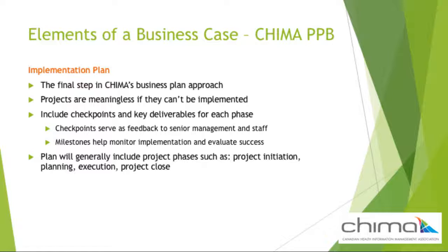These could include acquisition of products, testing, deployment, schedules, etc. Also included are monitoring mechanisms such as quality and communications plans and financial management. Execution details the approach to delivering and may include communication, training, and the approach to deployment. The last phase, project close, includes activities to complete the project, such as final documentation, stakeholder debriefing, and lessons learned.